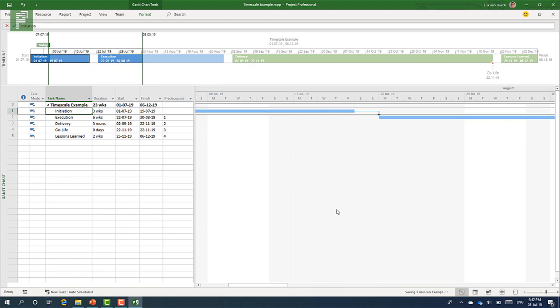Which makes sense because that is the standard calendar for the whole project. Let's get over with it. And, I have the example vacation. And, if I click on okay now. I will see that there's grayish color here. Now, if you have a resource that abides by this vacation schedule, that action that he's going to do or she's going to do will actually skip that whole time frame and move to the 29th of July for its next assignment.